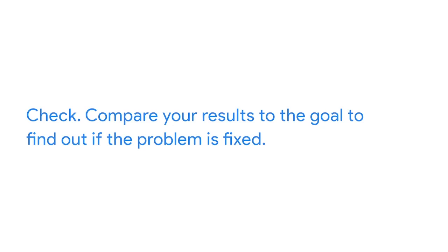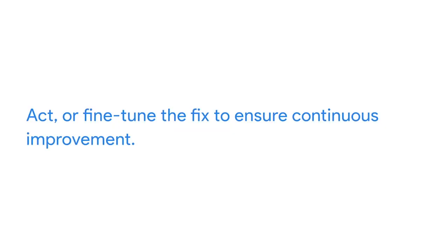The next part of this framework is check: compare your results to the goal to find out if the problem is fixed. You wait one week and notice if the sales numbers go up for that plant. If they did, your hypothesis is correct, and you've saved some plant lives and helped Office Green avoid financial loss. And finally, act — or fine-tune the fix to ensure continuous improvement. In our example, you decide to reorganize the website so that in the future, all overstocked plants will get a prominent place on the website.